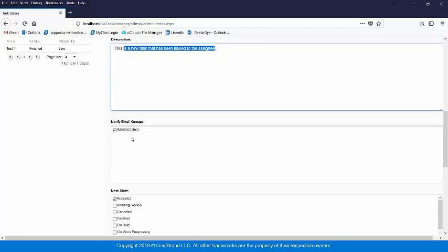So once you've got all your users in the system, you can set email groups up. And with those email groups, you might want to have that every time a new task is created, there might be team leads that need to receive a notification, so that they're aware that a particular person's just been given a task. When it goes into QA, it goes to the QA team, right?